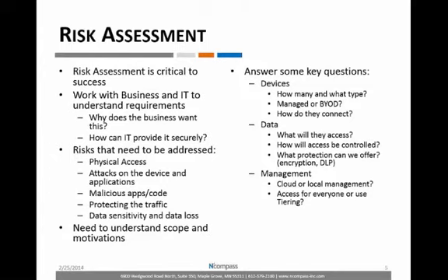Too often, I've seen an organization purchase a product because it's the right thing to do or because everyone else is doing it. I actually saw a company that spent north of $75,000 to buy a security event management solution. When they made the purchase, they knew they would need it for compliance, but they didn't get any real business requirements before jumping into the purchase. The equipment was bought on a fire sale at a deeply discounted price, and they thought it was a great deal. Fast forward 2 years, and keep in mind it was 2 years of maintenance at $15,000 a year, and they still hadn't implemented the product. It was racked, powered, and running, but it never got configured, and it was never used. The lack of requirements drove the priority of that project down, and it ended up being wasted money.